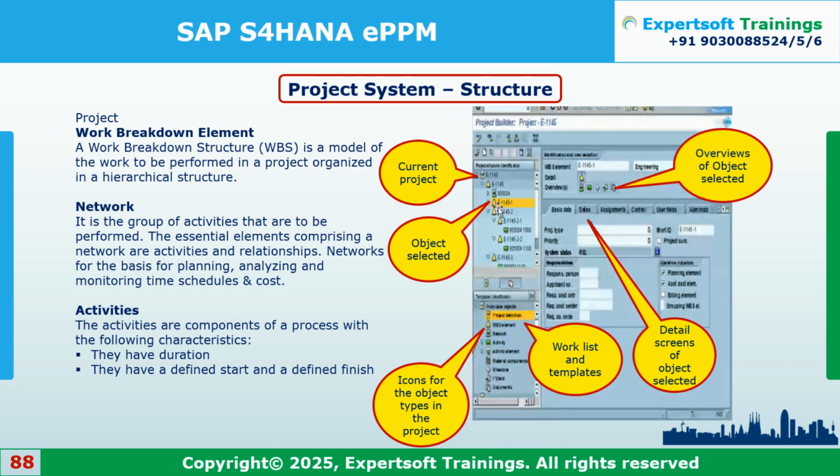That level 3 can be treated as your master data or a template, and you just drag and drop over there, so it will get copied. It may not be the entire structure you have to copy. In between, if there is some subset, that subset can also get copied.